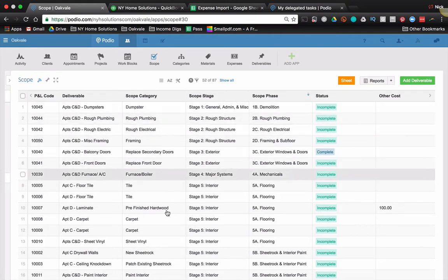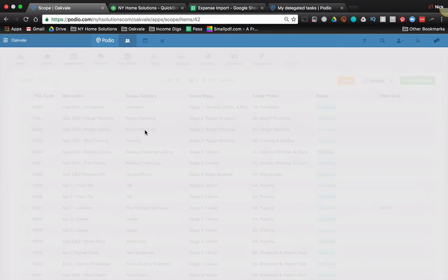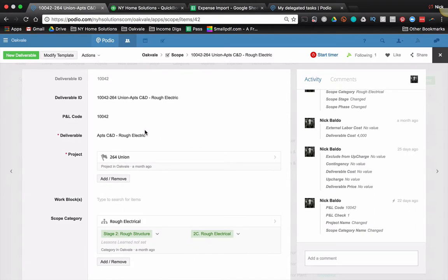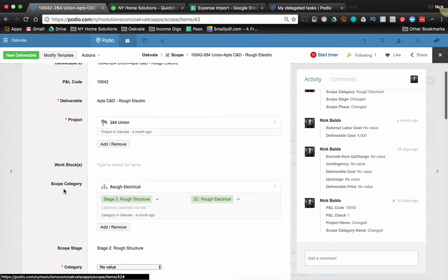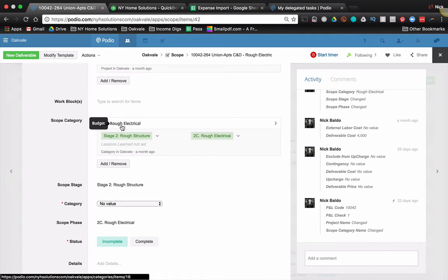Many of you may have seen this app before. It's taken several turns, twists and turns, and evolved over the years. But let's just pop into one of these scope items. And it's a pretty simple app at its core in that we have a deliverable kind of description, and we use a unique ID to give us an ID for the whole deliverable. We relate it to a project. We have a scope category, which is another app. This helps me to understand by category, by stage, by phase, how much things are going to cost.